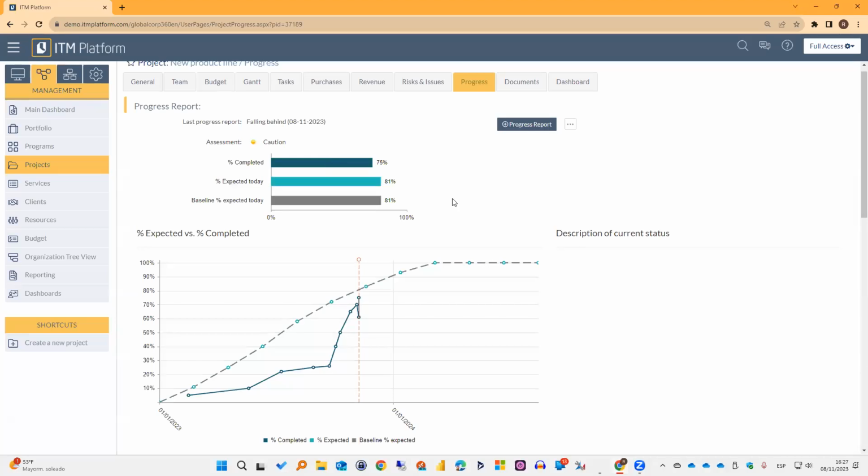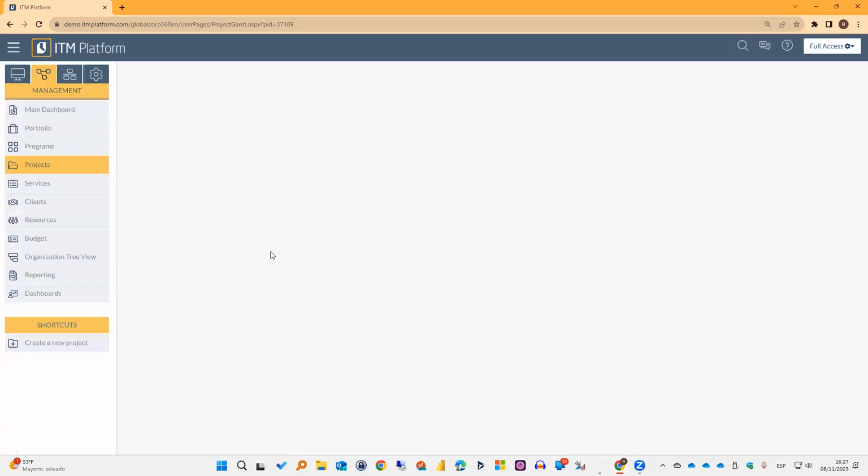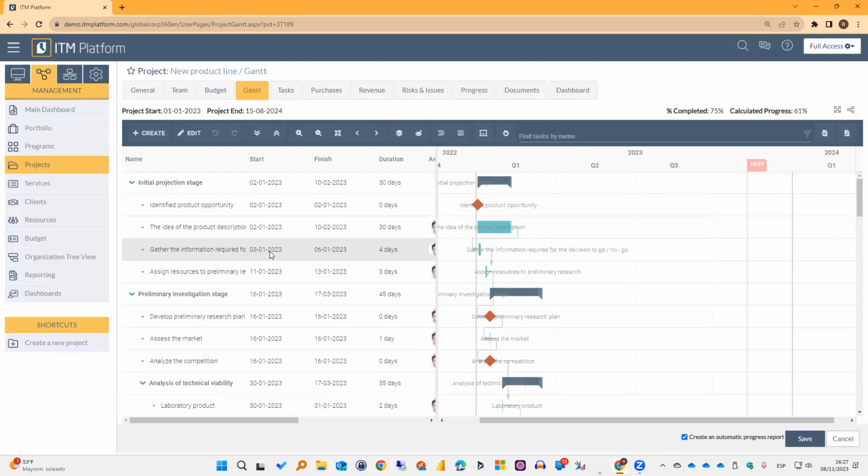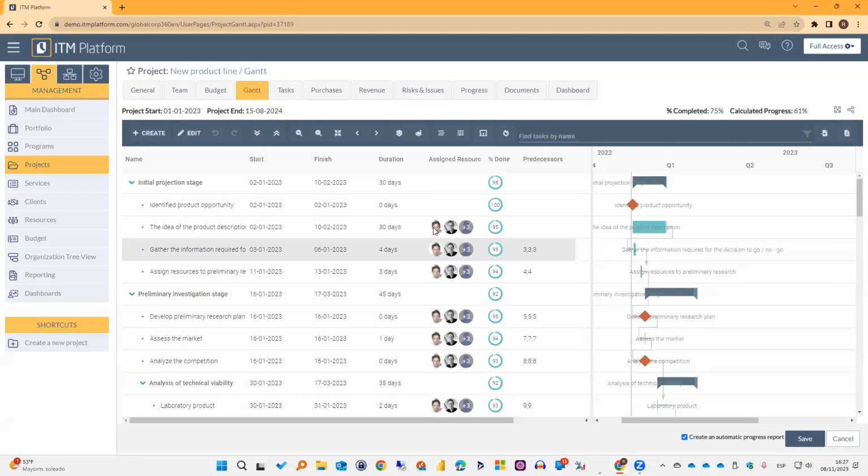As you can see, the platform by its own will give you a lot of information already, right? What do I need to have in place for this to work, for this to calculate accurately what you are seeing? Well, first of all, I'm going to need a detailed Gantt, right? It does not need to contain 5,000 tasks. It just needs to contain enough information, right? So I can assign those tasks to my resources and that they start reporting on time, right?